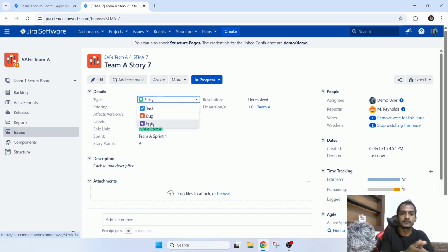Likewise, all these things are small requirements inside the particular API. So for these requirements, you can have different stories. A story you can write like, let's say, as an admin user, I should be able to edit the dashboard. Likewise, there is a method in writing the stories as well. Then inside the story, you can have multiple subtasks. For example, for the dev work, QA work, or else if you need to do some AWS work, some DevOps work. Likewise, if there is different work to be done, for each different task you can create a task and subtask as well, inside the story.